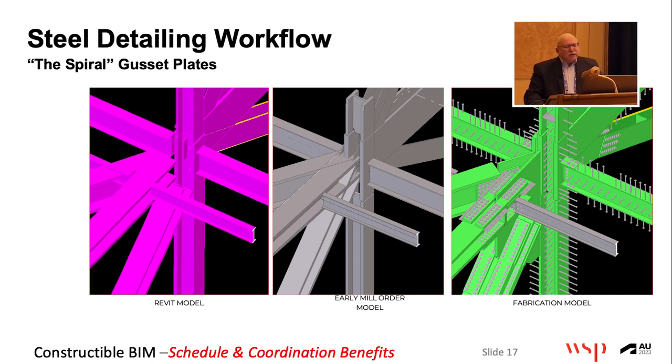And finally, I can say we're making headway. I just went through this on a new job, and we pushed for this early connected model process. The client, a smart, experienced client, but he wanted to save money. He said, why are you asking so much money for it? And I said, I'm not asking you for a penny. Either you pay us or pay the fabricator and their engineer. And I guarantee you, you'll pay them more than you pay us, because we don't charge by the weight of RFIs. We give a fixed fee and we live with it.